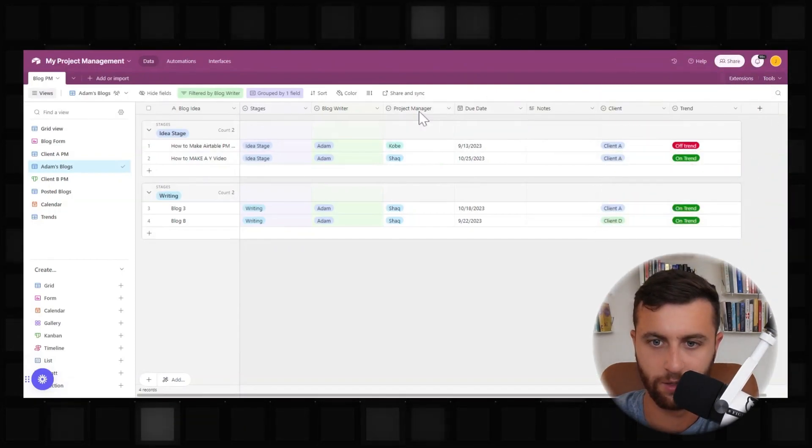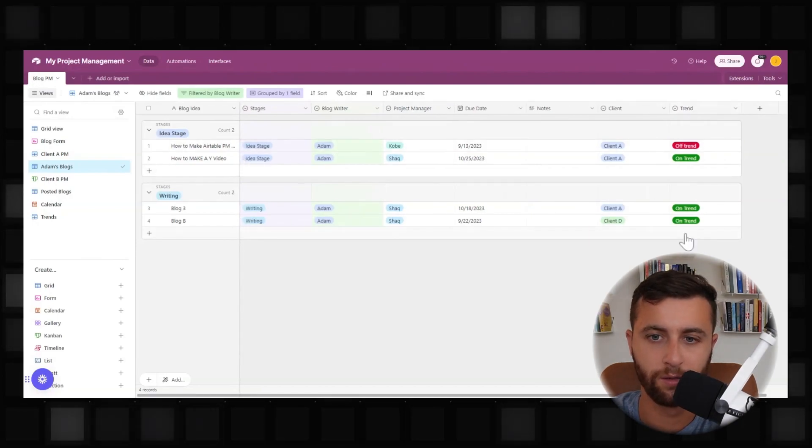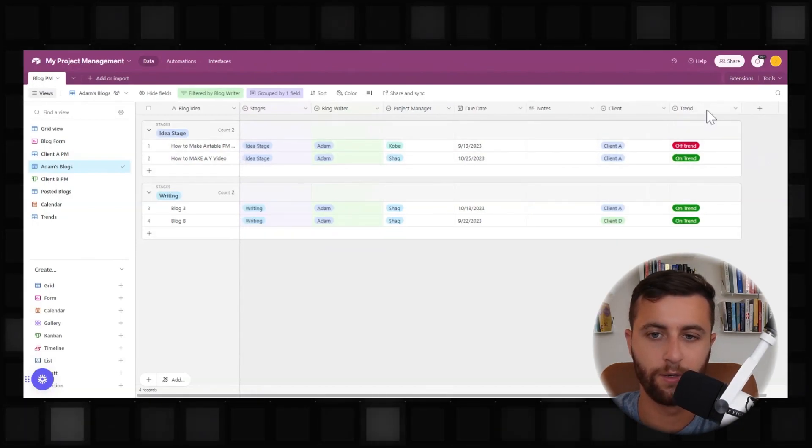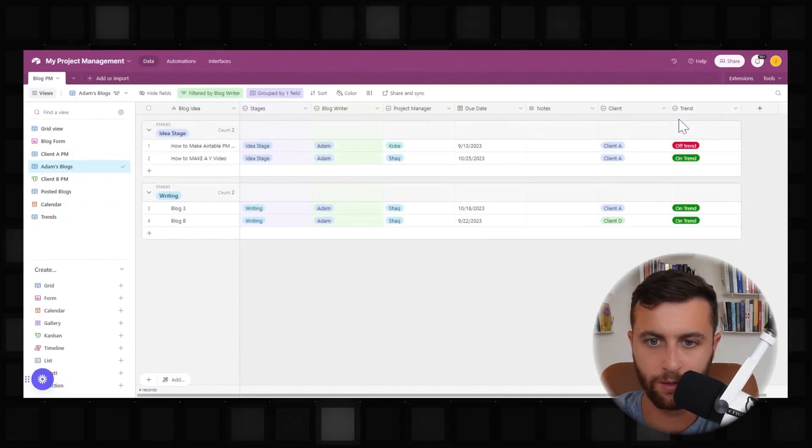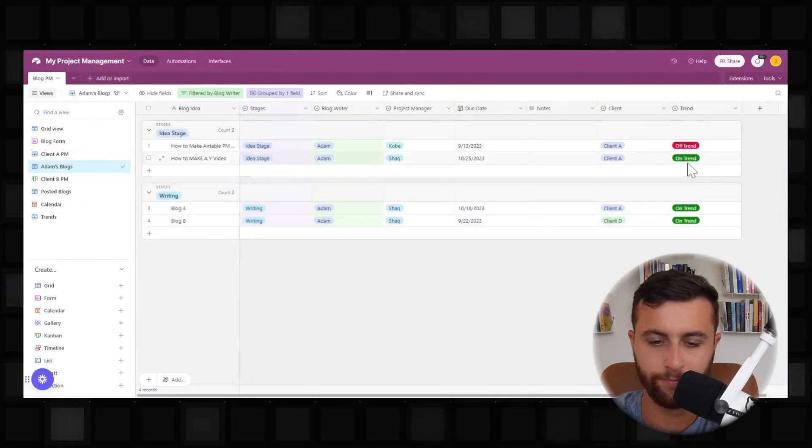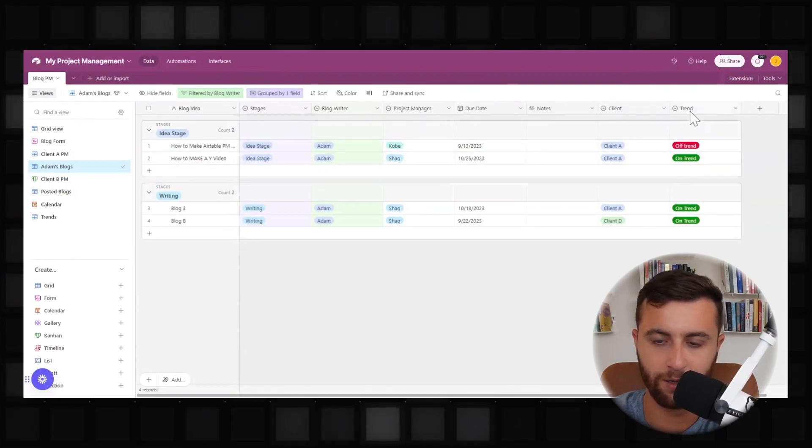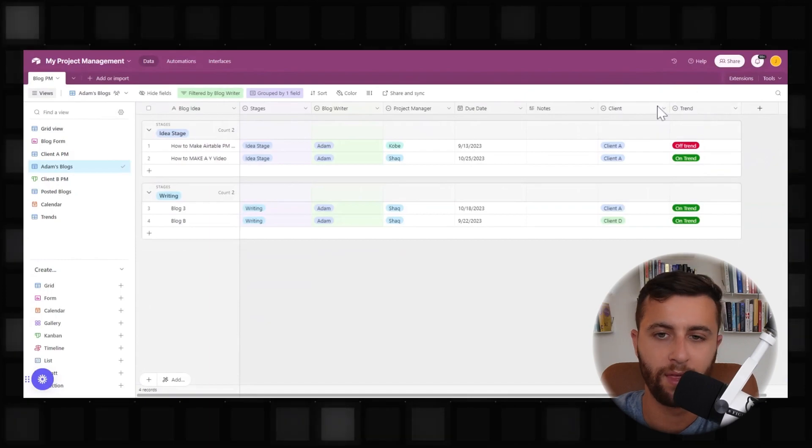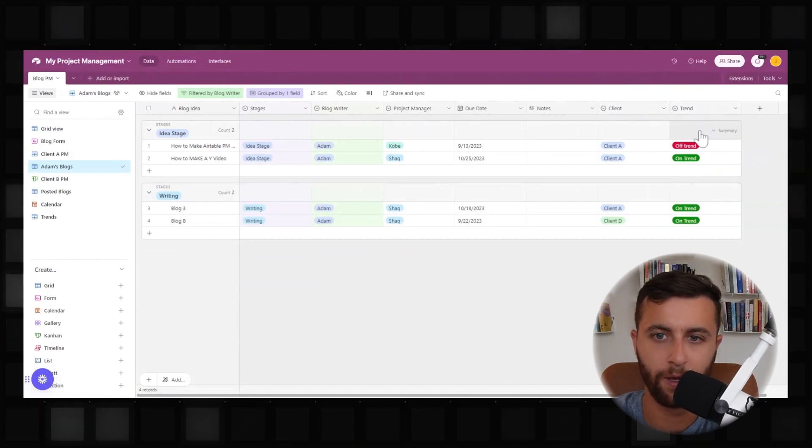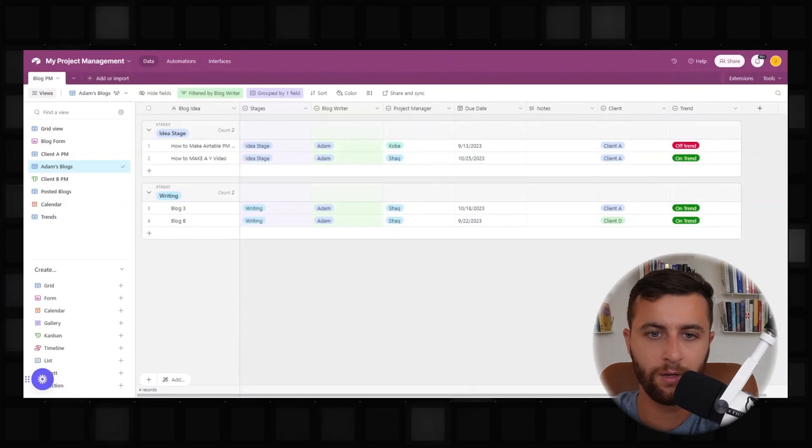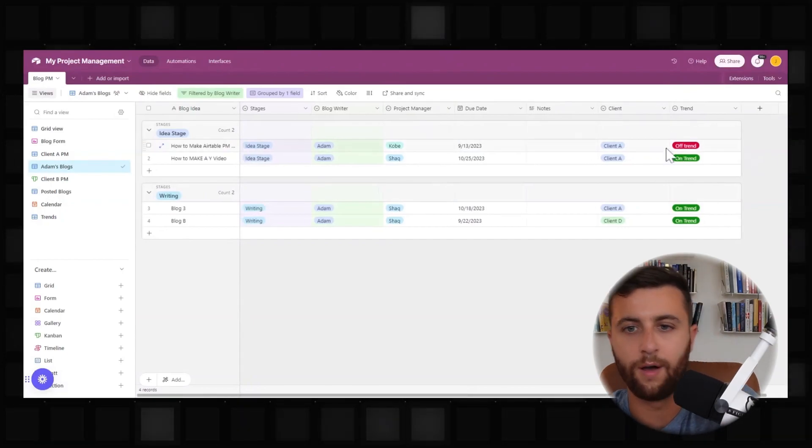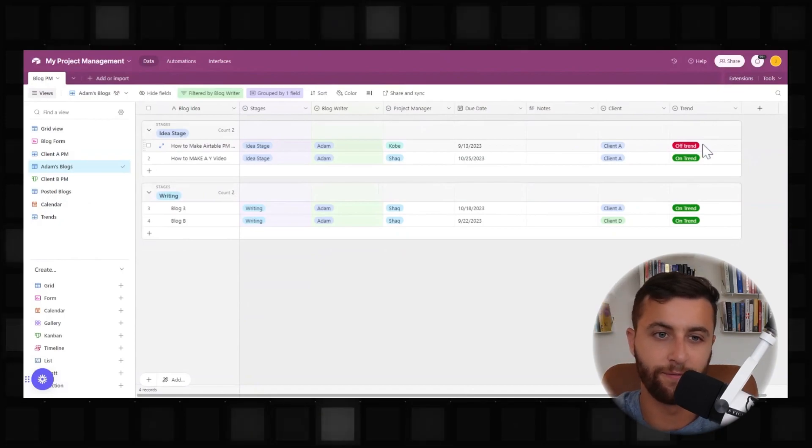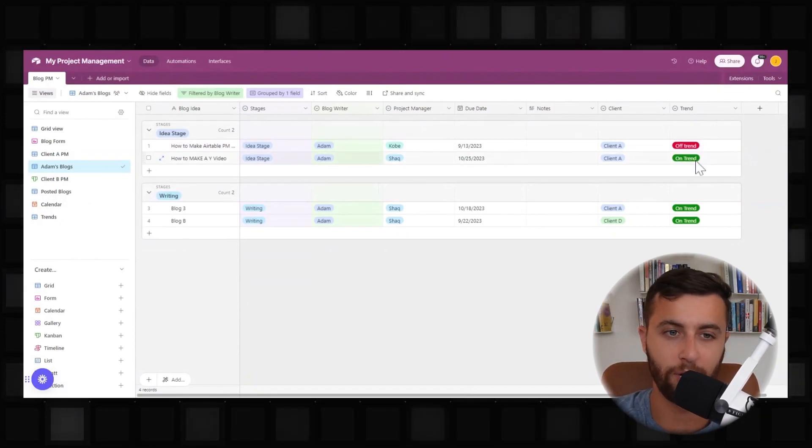And then I oftentimes like to add a column here, trend. I like to have trend because it shows on trend, off trend. So this is green. This is red. So it's kind of like green, yellow, red. So this is something that's very qualitative that if you look at it, like here, I could start to say, everything is on trend besides this one, which is off. Now I could further filter and make filters around it being off trend.